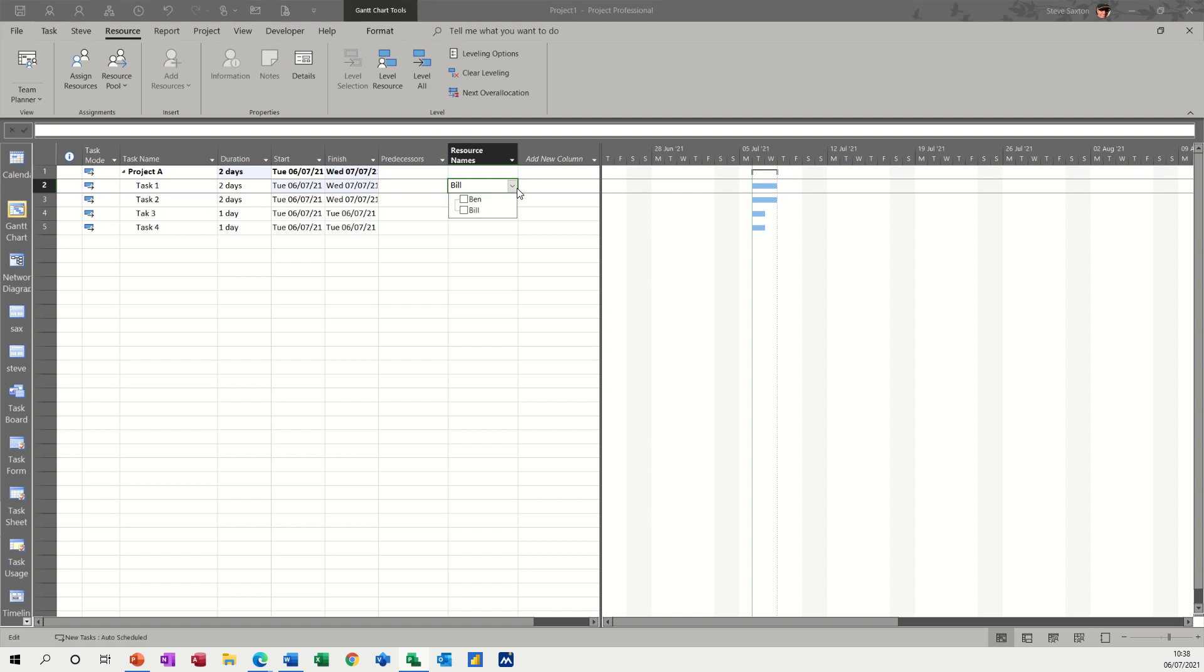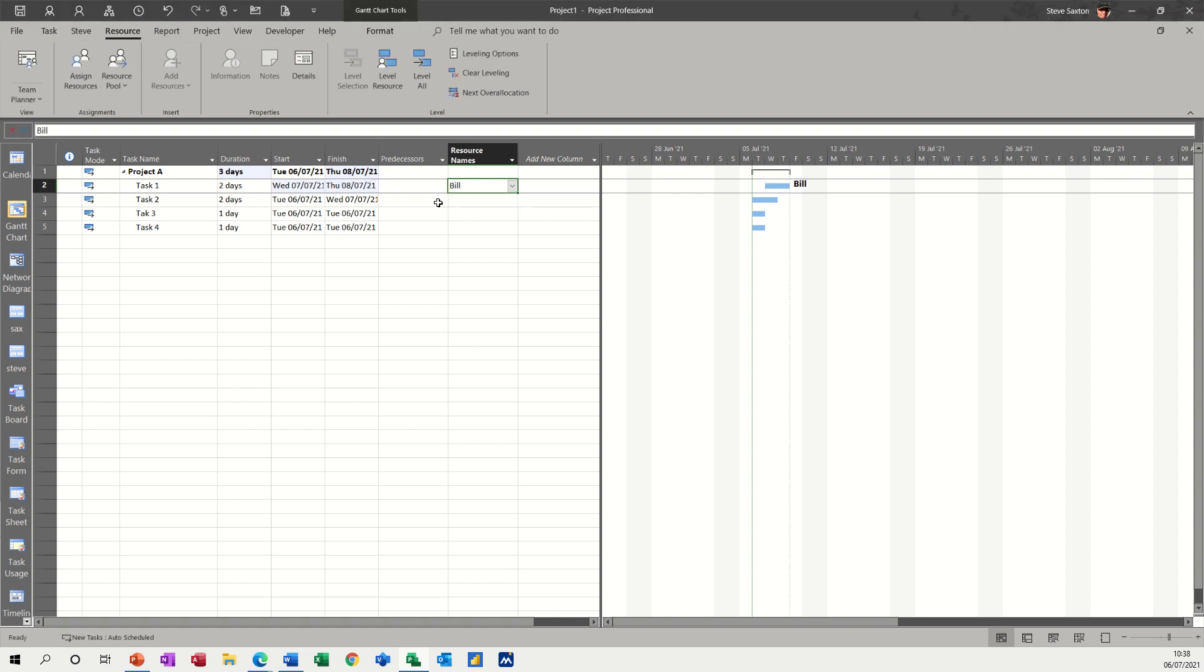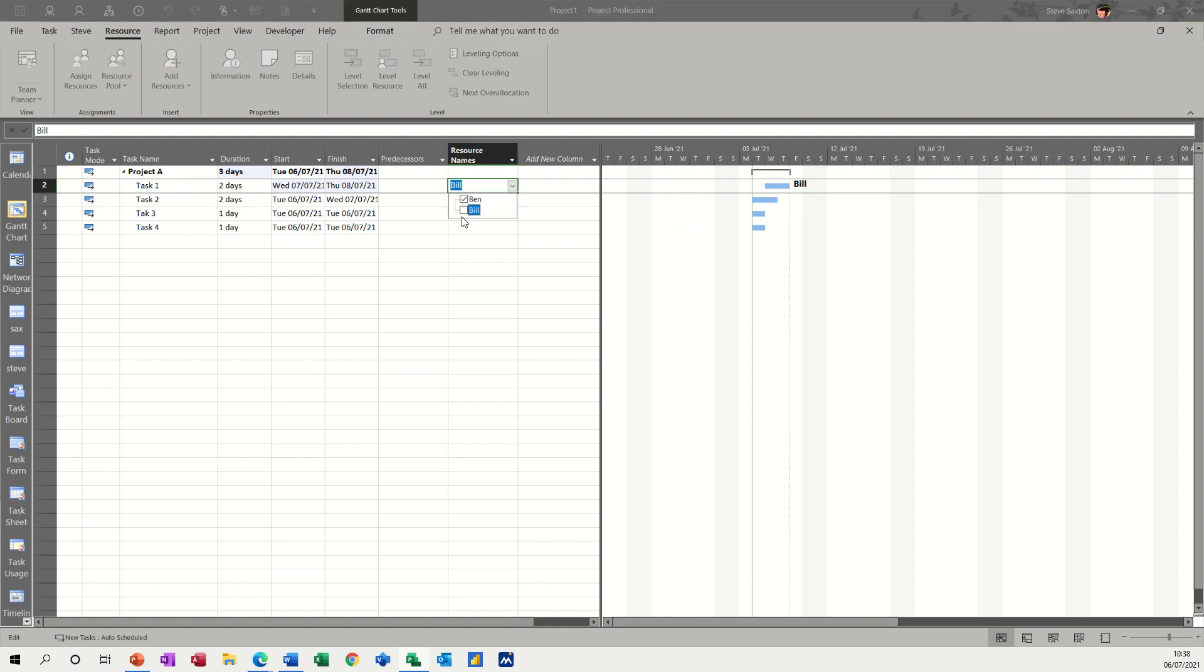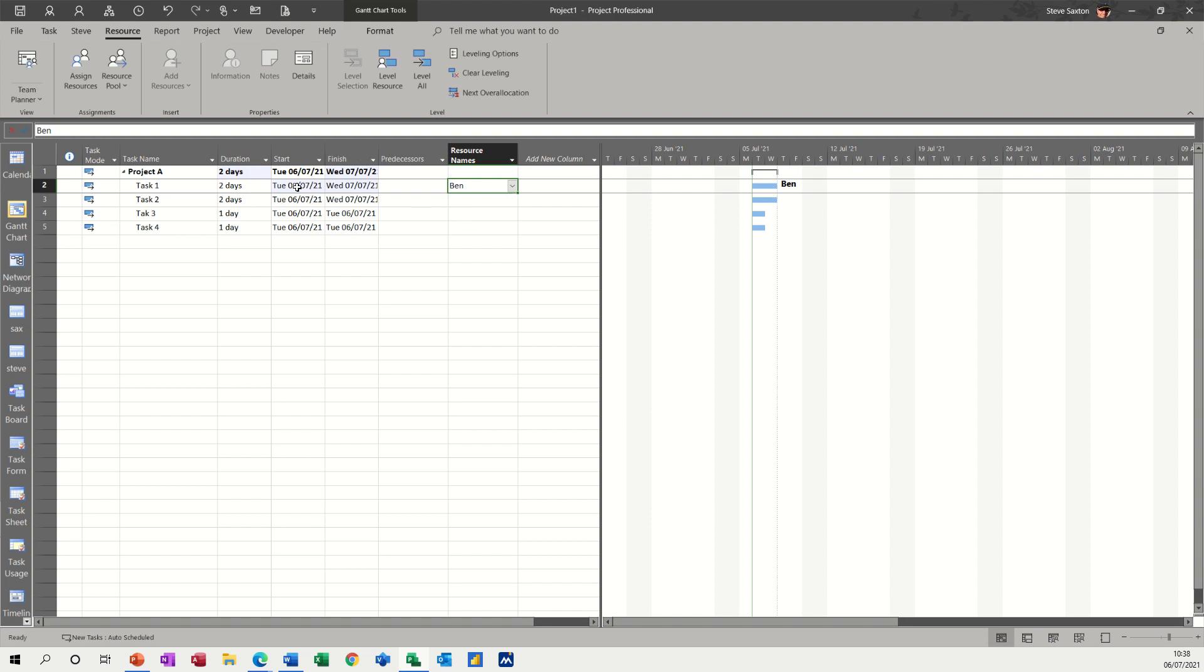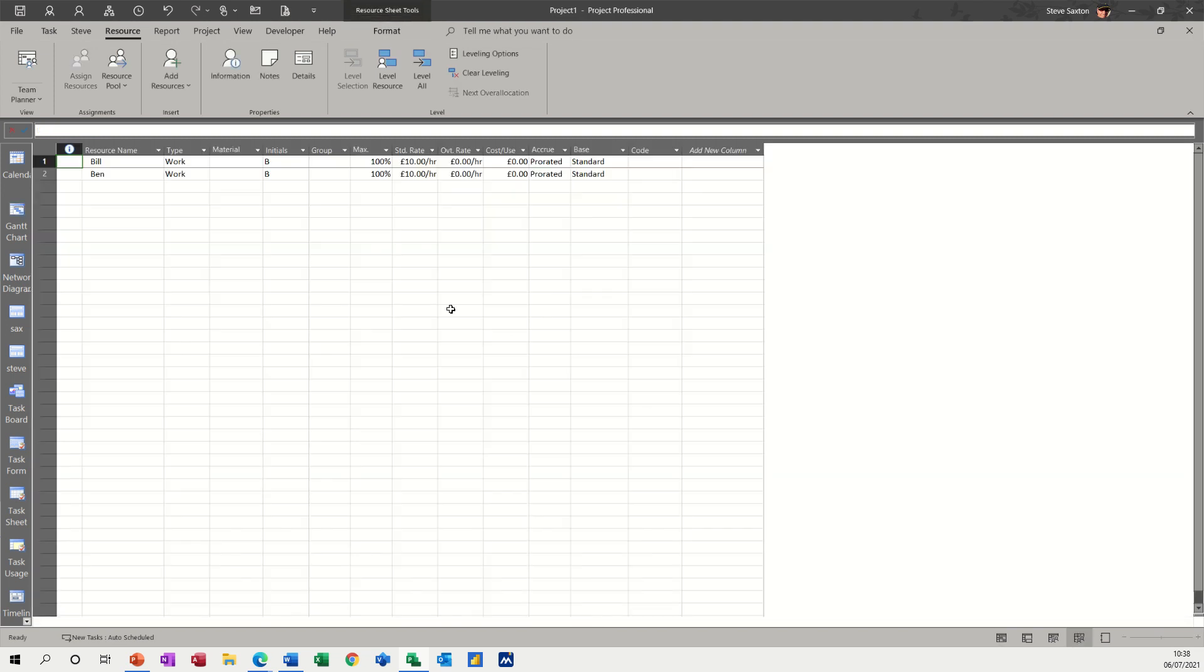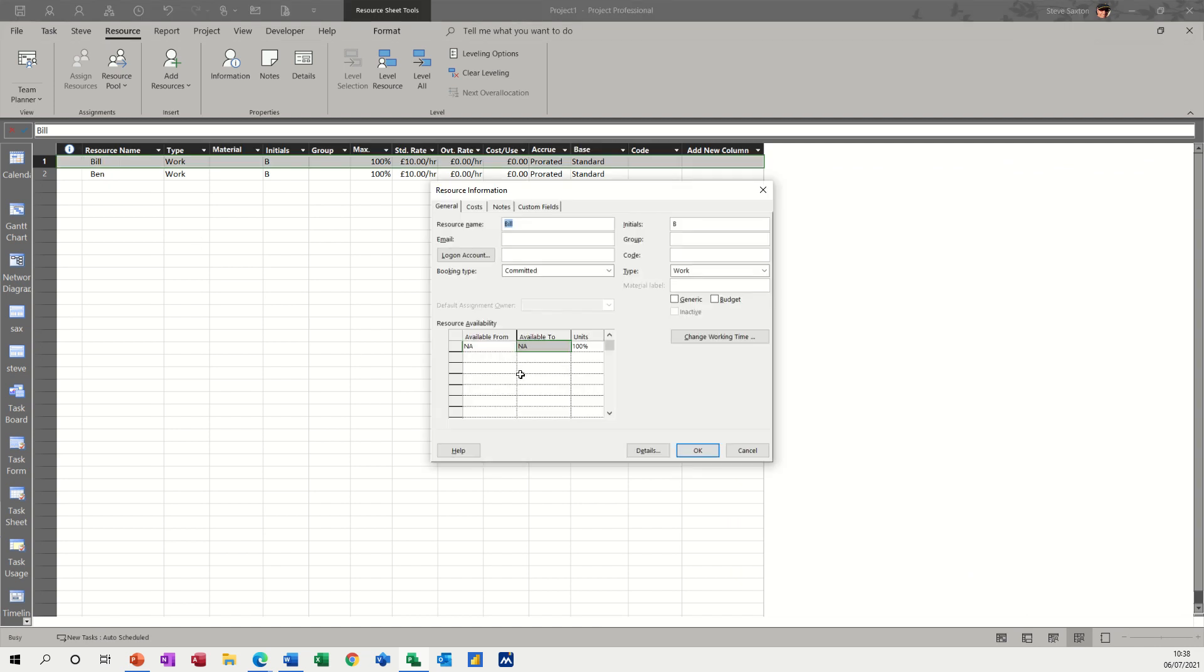So while Bill's on this task, if I get rid of Bill, now it's pushed it back to Tuesday. So if I add Bill, it's pushed it to Wednesday because he's not available. He doesn't work on Tuesdays. So what I'd have to do is put Ben on this, take Bill off, and then it can go on Tuesday.